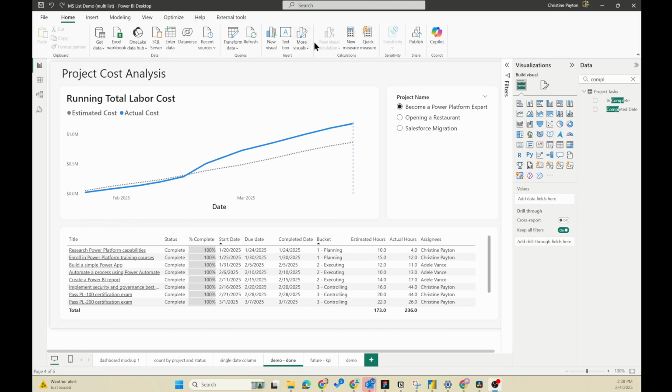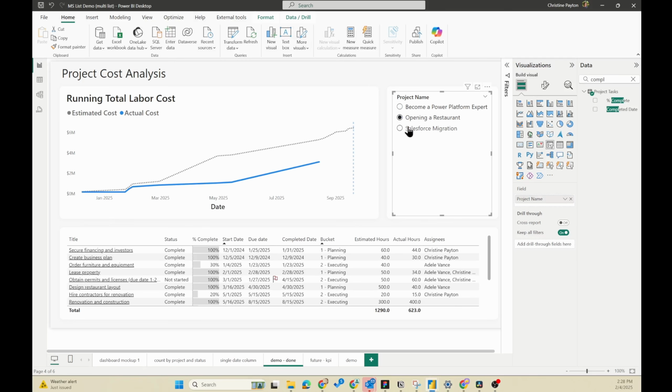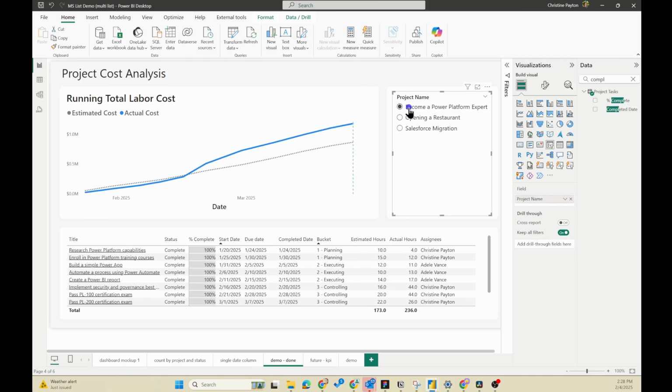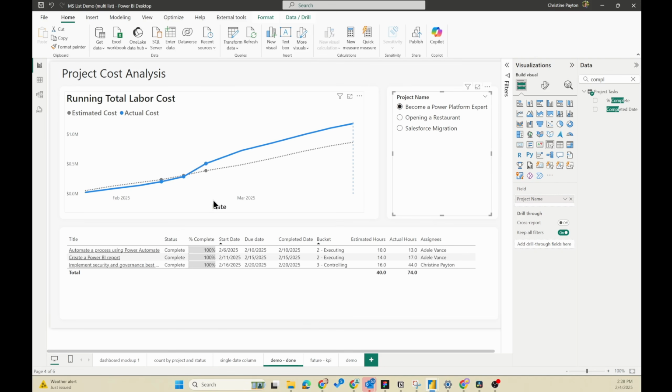So typical use for cumulative sum charts is to compare things like actual cost versus budget or versus an estimate, even something like a burnup chart in Scrum where you're showing progress over time. The idea here being you can see where things started to get out of control, where the costs passed a certain estimate. You can select it in the chart, see what happened, see what was going on. And in this case, I have a constant line thrown in at the end of the chart to show how far we are into the project schedule too, because that's relevant.